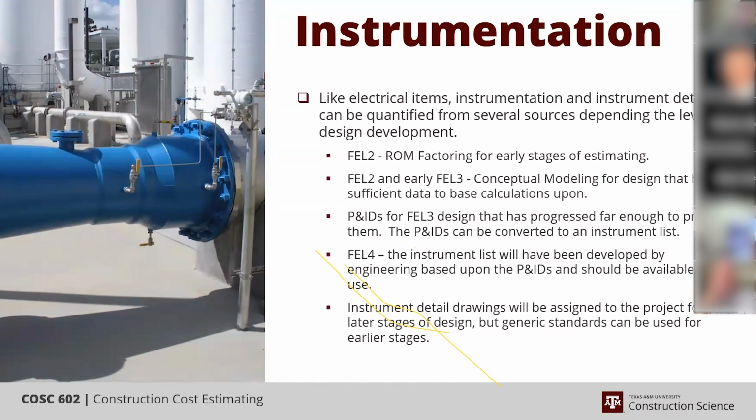Instrumentation, we always tease them about bringing up the rear. They're one of the last things that's completed. So that means in your earlier stages, you're really purely factoring or conceptualizing. And I know it's kind of repetitive, but there are software programs out there that have the capability of modeling these things with very little data.